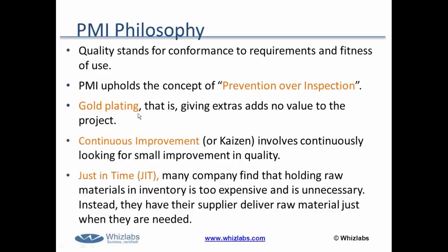Let's understand another term called gold plating. That is giving extra that adds no value to the project. That means if the customer wants a modem to be accessed only from 20 meters of range, don't try to work on something extra so that you deliver a modem which you're able to access from 100 meters, or probably you have overspent additional time and additional cost to make customer satisfaction. So no, that's not called customer satisfaction. That's called gold plating. So giving anything extra is called gold plating.